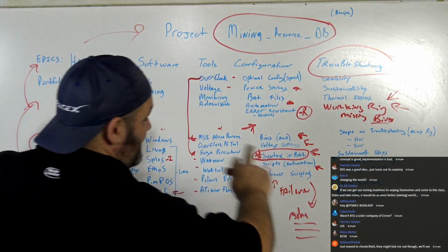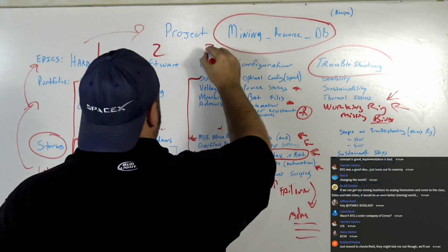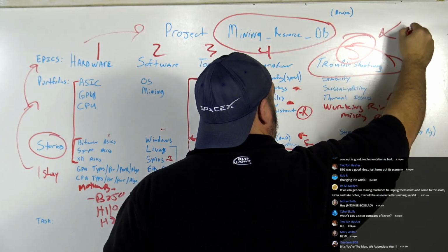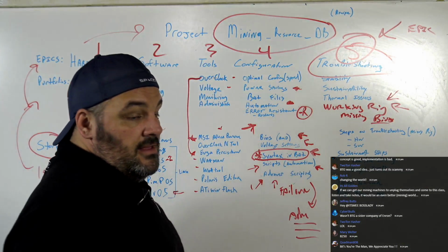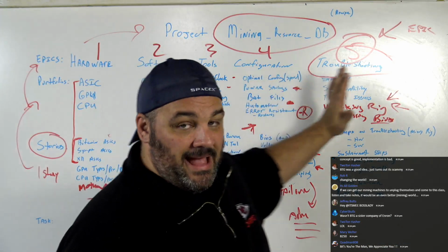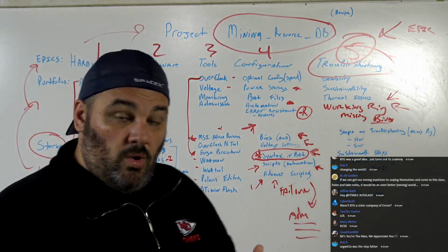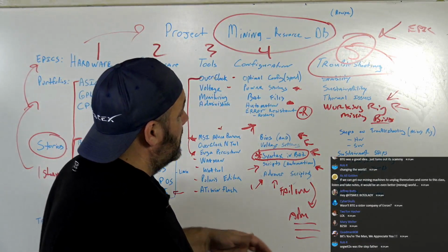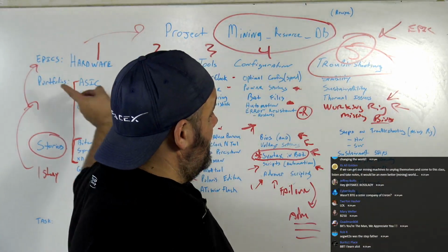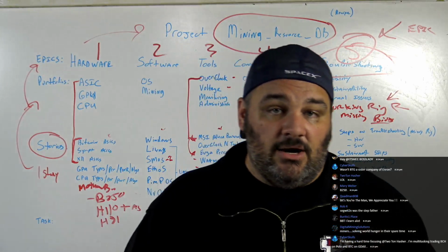So part of this activity on this video, I want folks, if this is number 1, 2, 3, 4, and 5, if people are saying number 5 Epic is the most important, we're going through the Scrum session right now. Part of the Scrum session is going through a product backlog, identifying to make sure that we're consistent on what we're trying to create or present to a product owner, and then setting a priority. Priorities are key. Everybody wants everything. But if I said you can have 2 things in 1 week, which 2 are they? That's the way you present that argument.